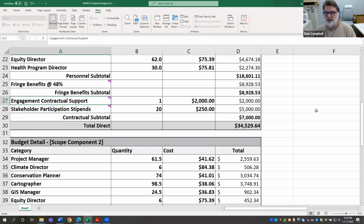Yes, it's quite possible that we would use both of them. If your construction is done at all in-house and you're trying to break down costs, say you're a municipality, you will use an SF 424C for a construction budget. But if you just contract for the construction, you can actually still use the A.